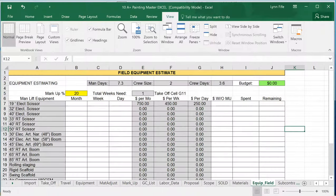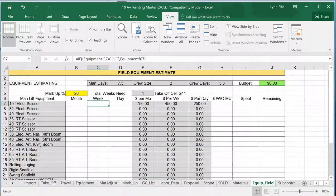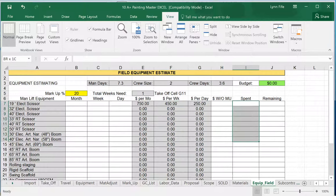We also have my field report for the equipment so that when I would have typed in one here, it would have told my field manager to get one week of 19-foot scissor lift and here's the price we had bid for it. It also allows them to put in how much they spent for it and how much the remaining balance is, so we'll keep track of that.